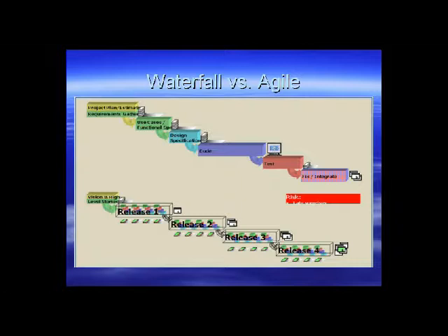The Agile model, shown on the bottom, still has a vision and high-level stories, but you'll notice each release box has several colored boxes within it, meaning the highest priority work gets pulled into that release, including requirements, design specifications, coding, testing, bug fixing, so that at the end of each release, there is something reviewable by the customer which provides iterative feedback during the software development process.